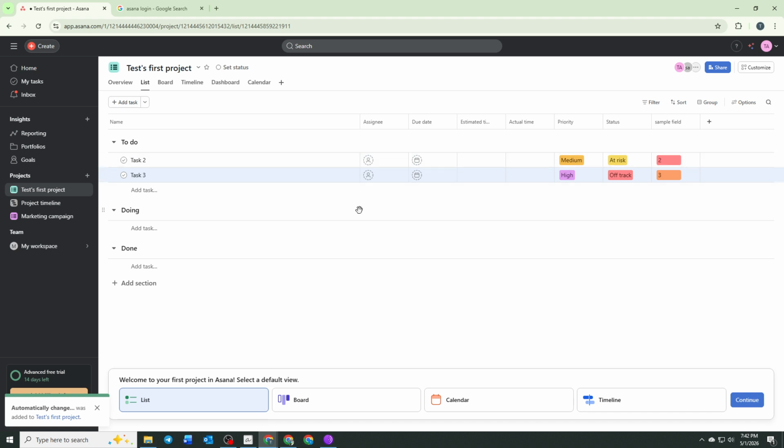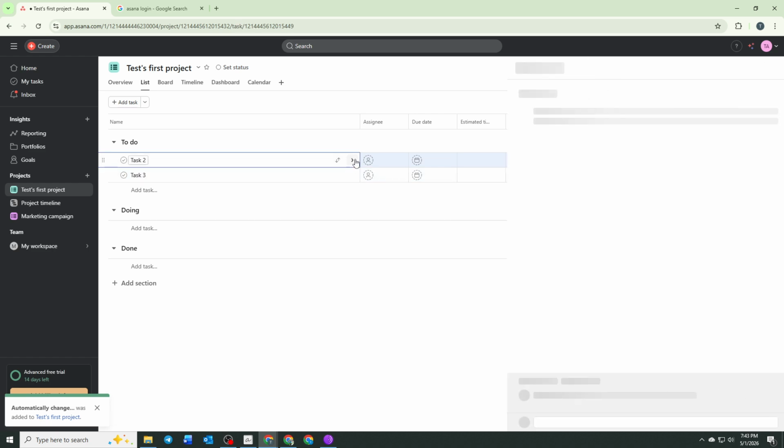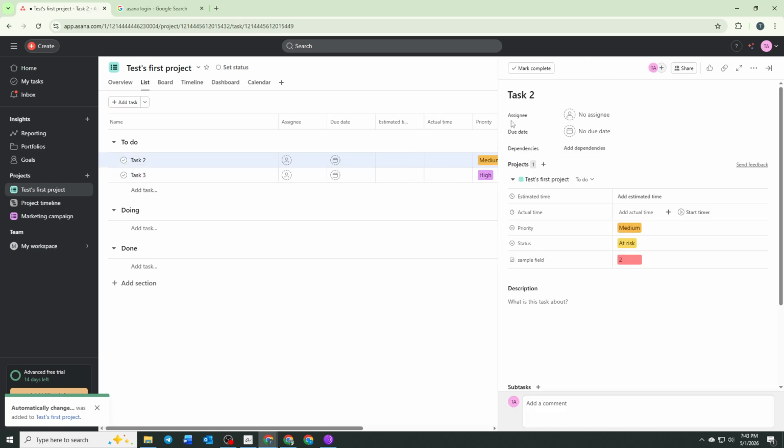If your team struggles with unclear responsibilities, the solution starts with assigning every task to a single, clearly defined owner. Each task should belong to one person to ensure accountability. When responsibility is shared too loosely or left undefined, tasks are more likely to be delayed or overlooked.